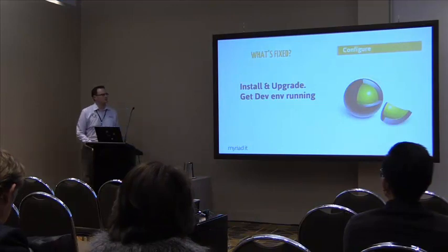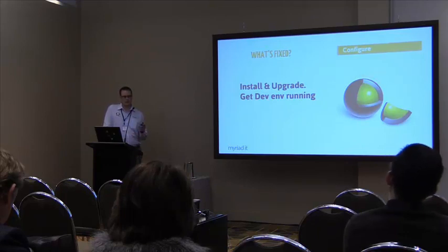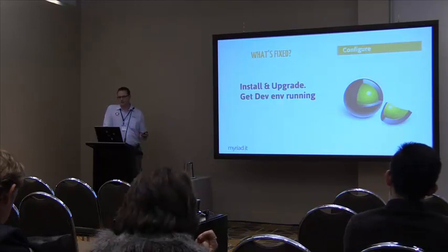Configuration. This is your retrofit. It's also your first cut across of your upgrade. When you're talking about this, you can go 2 ways. Most people cut across the development environment and upgrade that. You're looking at 10 to 15 days of work to get that done.